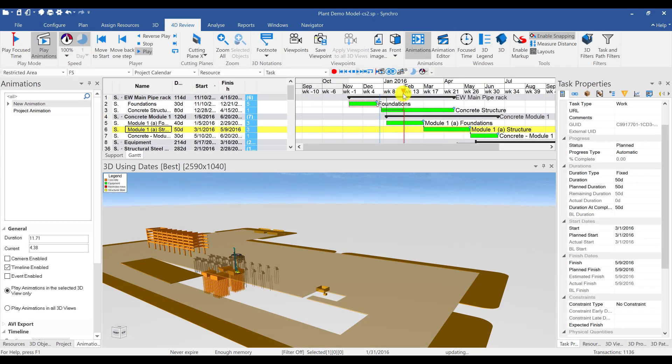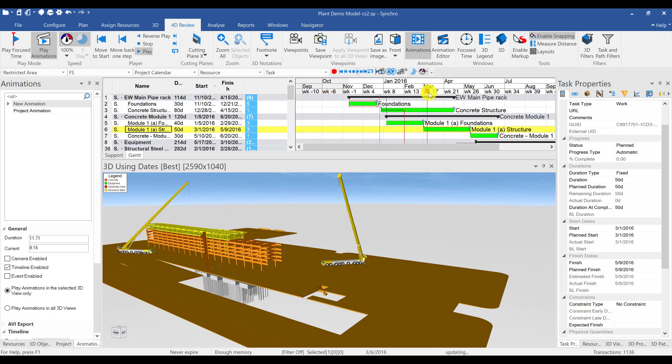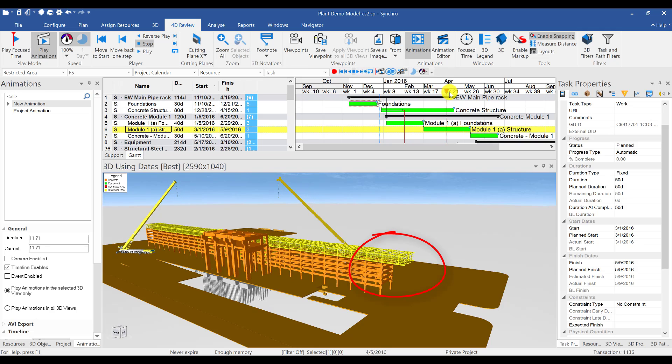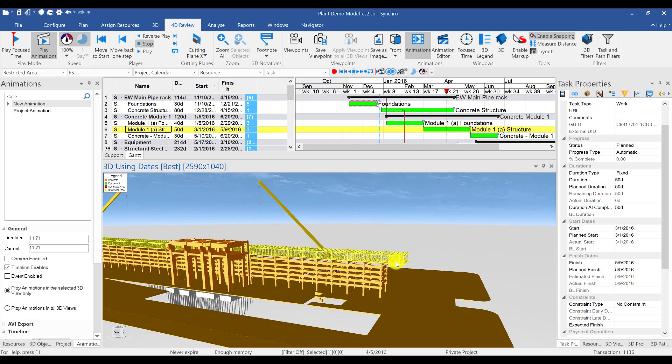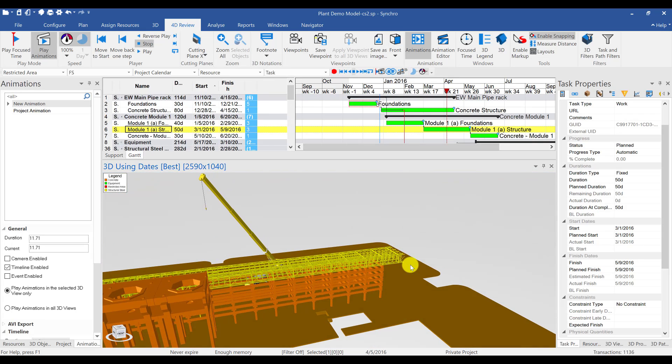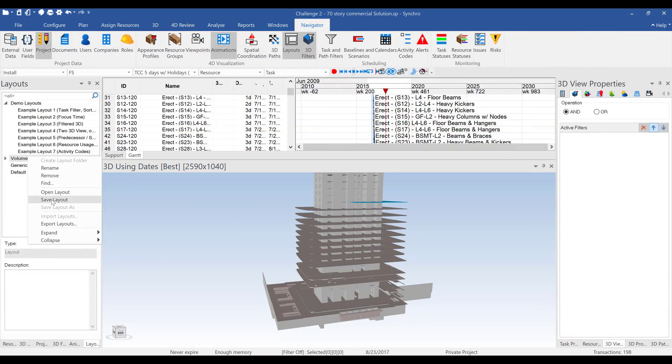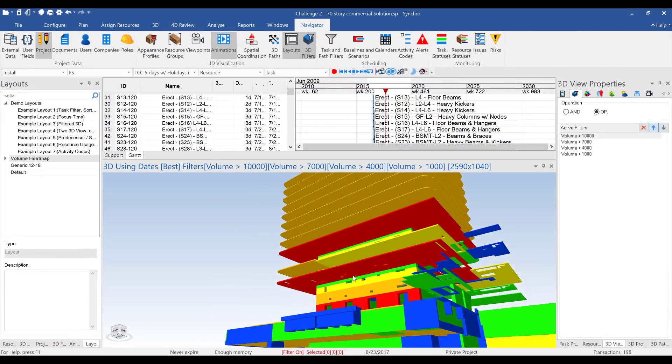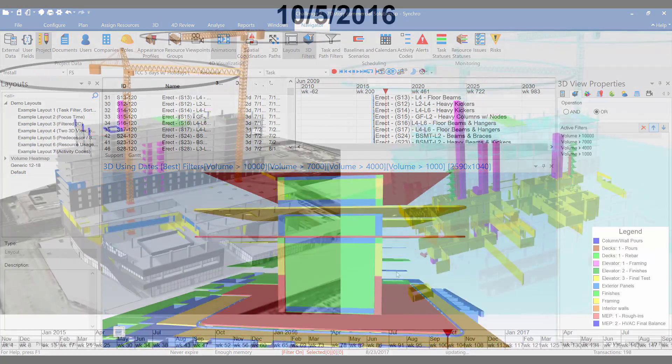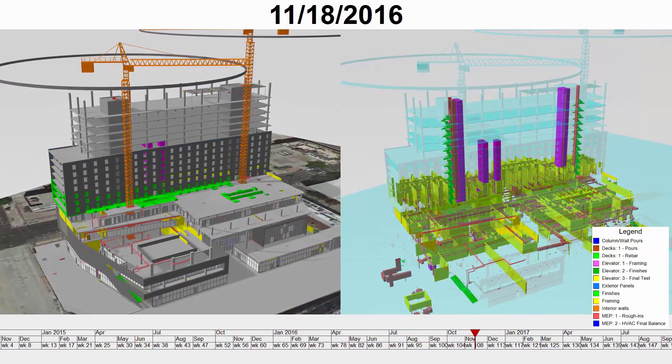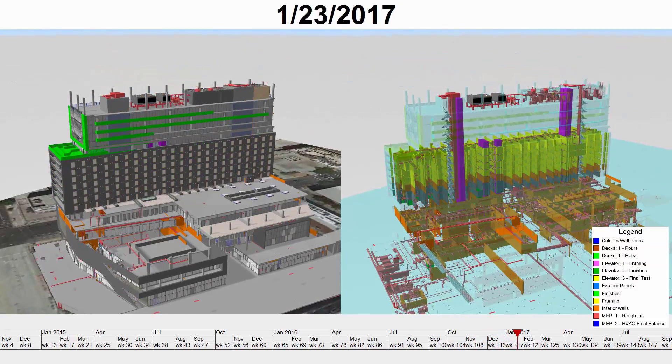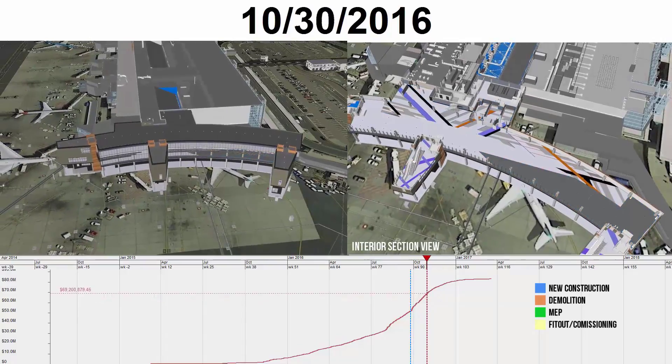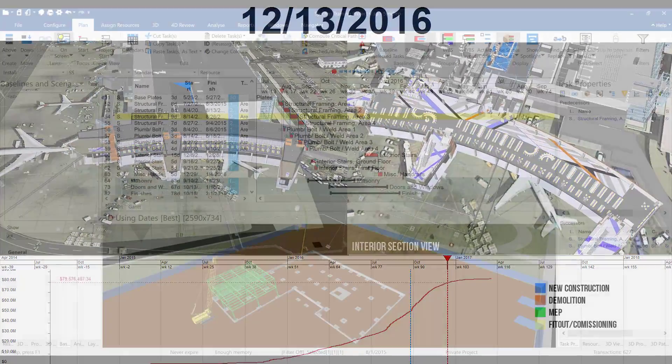The first step is to always scrub through the focus time or generate an animation and watch it while keeping an eye for any schedule inconsistencies. It's also extremely important to show the animation or pass around the SP file and get feedback from the people actually doing the work. Next, you'll want to use filters and cutting planes to highlight different scopes of the project that you might want to analyze separately. In this example, a filter is used in the right window to show the interior works happening on the project. And here, we are seeing a cutting plane used to show work on interior finishes.